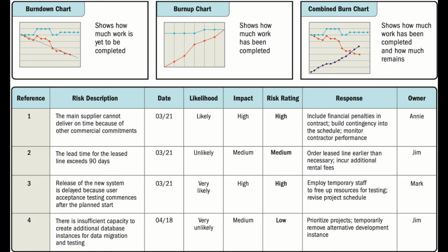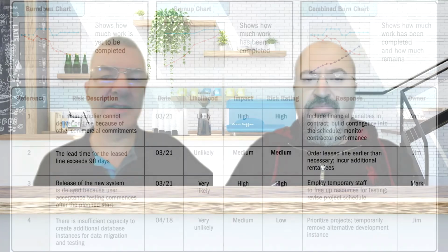They are posted in a place where people can see the information easily, rather than having information in a scheduling or reporting tool. BVCs should be easy to update, and they should be updated frequently. They are often low-tech and high-touch in that they are manually maintained rather than electronically generated. The figure on the screen shows an information radiator associated with work completed, work remaining, and risks.